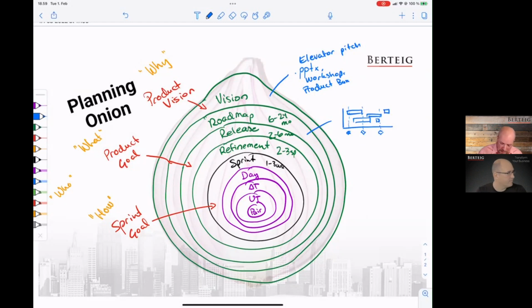Now, release, the most common way I draw or visualize this is simply a timeline. If I do it talking with a product owner or business owner, I draw a line on a whiteboard or on flip chart paper, and I ask, what is the relevant timeline for you? And they might say, well, we are thinking about 6 months ahead with this release. Let's say it's the beginning of February now, they might say, we want to get a release out before summer. So before the summer holidays.